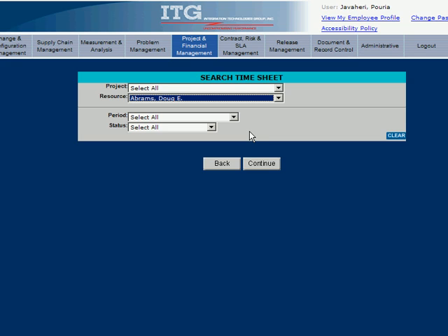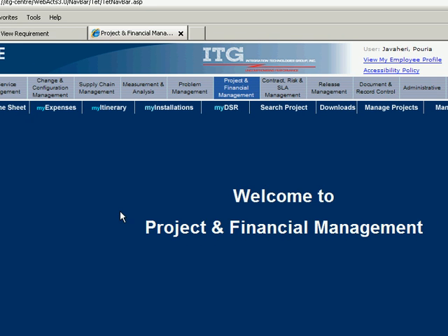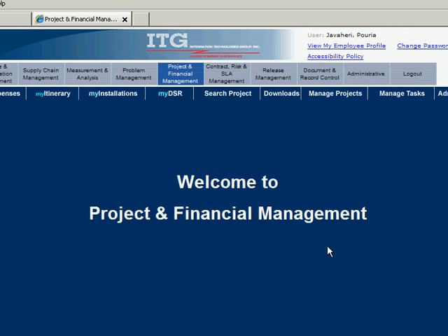Every time hours are edited and saved in any timesheet page, the system will update the total actual hour values of the affected task. These are the actual hours that are displayed both in the individual task screens as well as the project screen. The resource supervisor or administrator also performs the task of approving resource timesheets once they have been completed and submitted for approval by each resource or user.